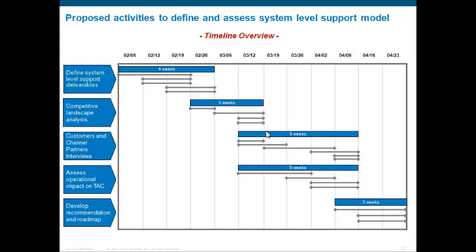And very quickly, as an executive or as a manager, I can start to understand where the heavy load of this project is, right? I can also begin to assess risk points. One additional element to this might be key deliverables or gates. I might want to put a big red star right here that says I'm going to have an interim deliverable.